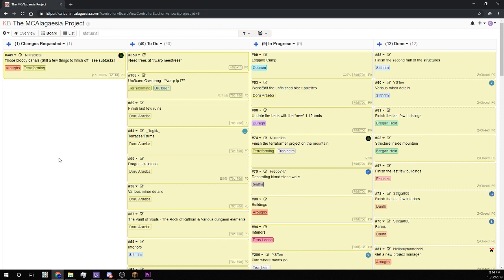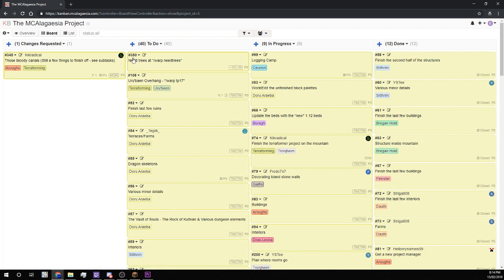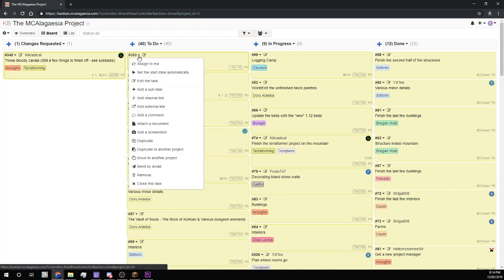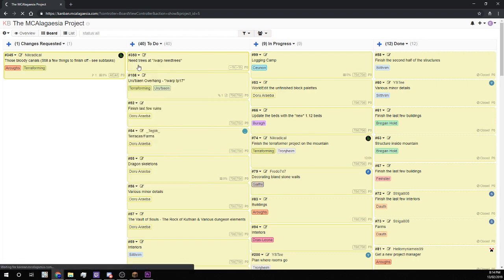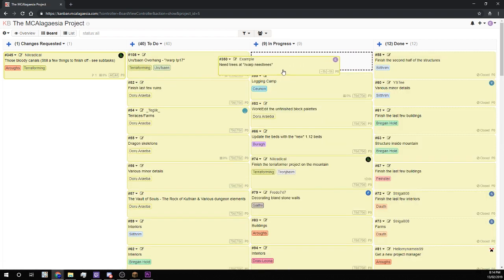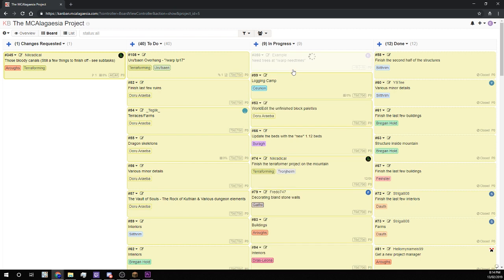If that was a bit confusing, don't worry because I'll go through an example now. So all I need to do is pick a task and I can assign it to myself by clicking the Assign to me button on this drop down and I'll also drag it across to the In Progress tab so that everyone knows I'm working on it.